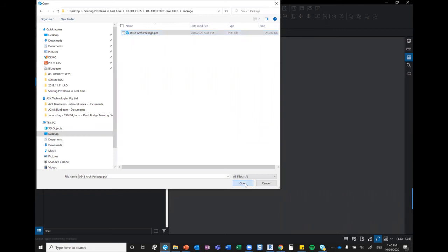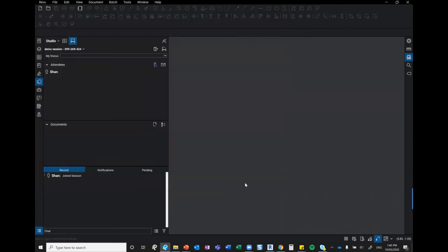Inside studio sessions, we aren't able to put in sets as such, but a nice workflow that I do is just putting a combined package all together. So there's some really nice workflows within Bluebeam where we can combine drawings. We can keep the file name as the drawing index so that it all ties through so it's easy to find. And once you finish the files, you can then push them all apart and put them into an updated folder.